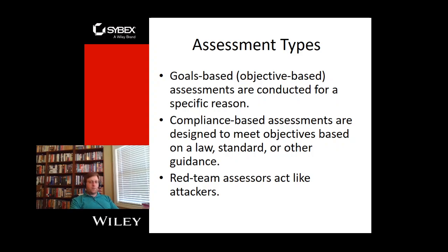So if somebody says, well, you've got 3 days and 2 laptops and 3 technicians, and you're supposed to hack into this network, that's going to be a really different sort of test than if you have 3 dozen people working for you and all the network resources that you can get your hands on. The scope of those tests are going to be changed by the budget. So that's something to think about. What exactly is this test designed to accomplish?